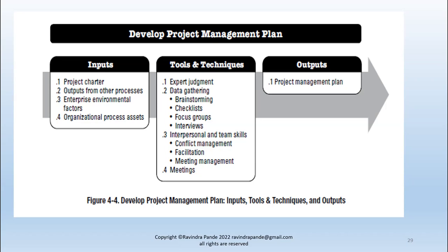With every project review meeting, normally weekly, but there are organizations that have project review meetings every fourth day, or even every month, depending upon local policies and procedures, we update this project management plan accordingly. So project review meetings are the basic time when we update the project management plan.